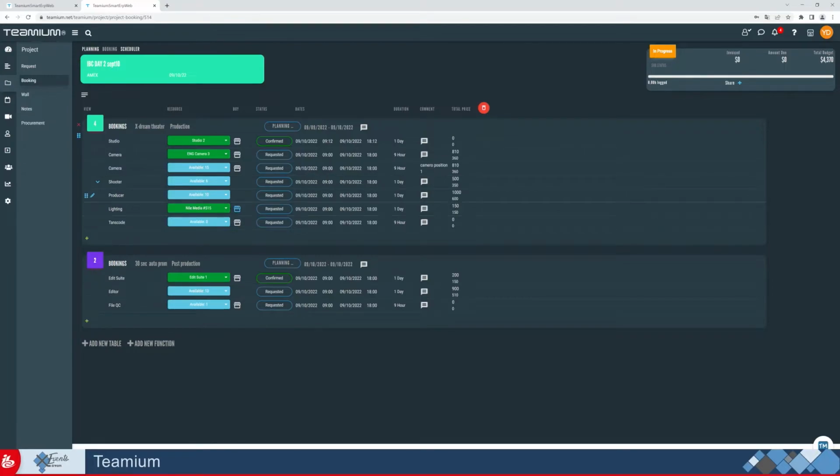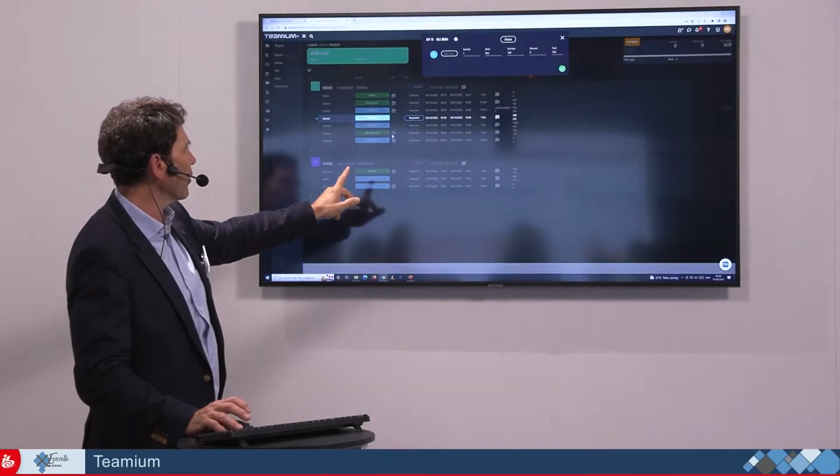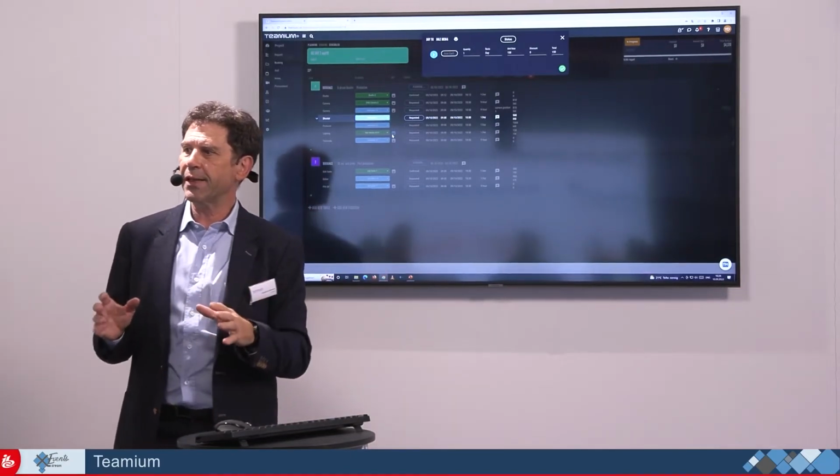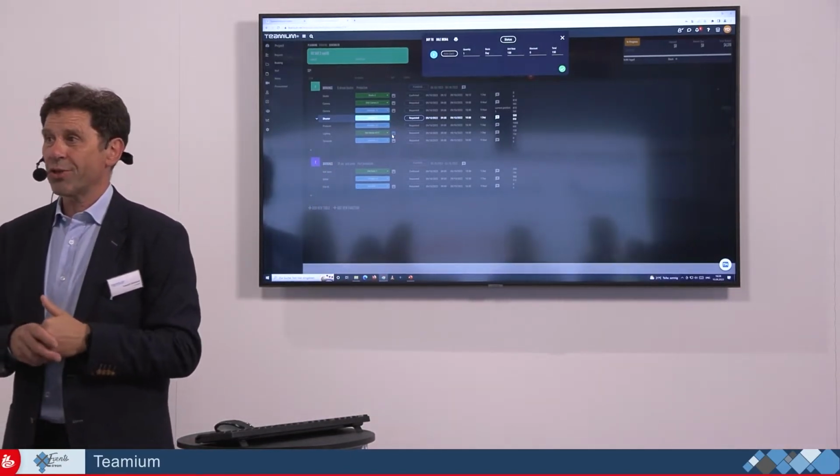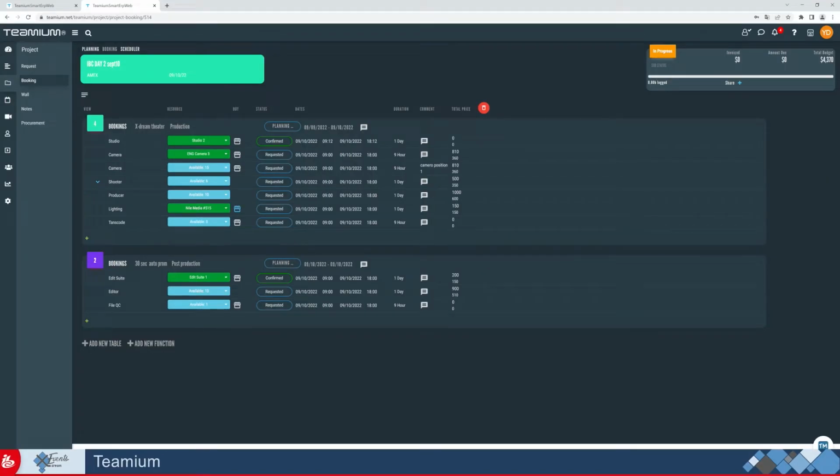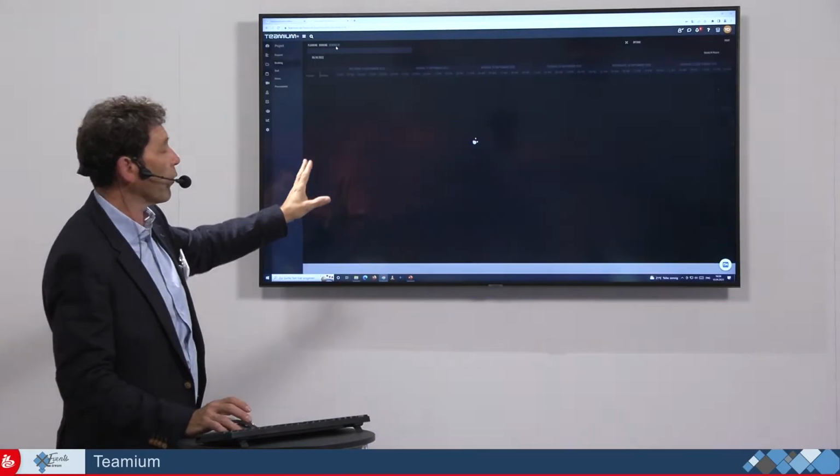What you notice here is the capability to create a purchase order inline. What this means is that you don't have all the resources in your facility and you externalize. In this way, you can directly create the purchase order and send it by mail. And what do we track right there? Any information and status, and it's part of the project.